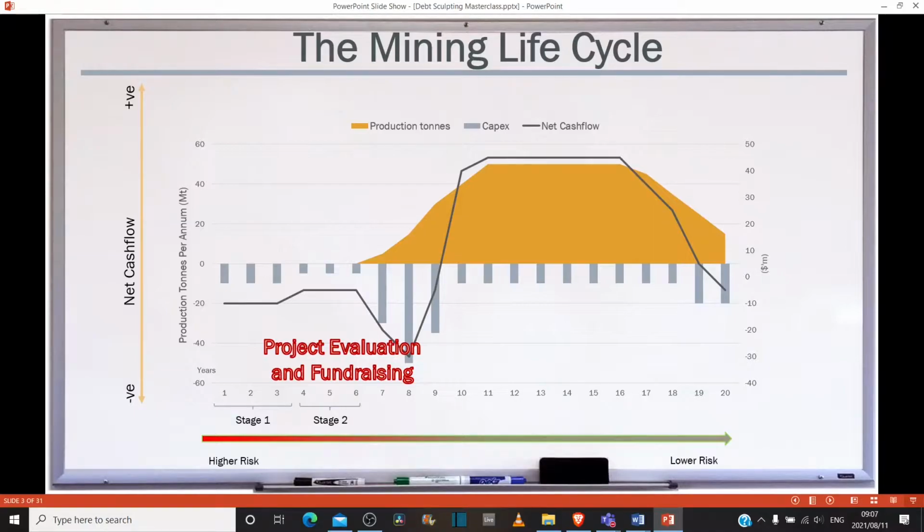Not only that, but you also get some professionals in to do costing and cost estimates, some preliminary ideas of whether you should mine this ore body using just a truck and shovel, an open pit mining method, or whether you should go underground. So you get the engineers in, and the financial professionals in to do some cost estimates for you, and then you come to a conclusion as to, given the mining method, given the ore body, and given the likely costs, can we make this project work? Once you get to that level, then you are at definitive feasibility study level.